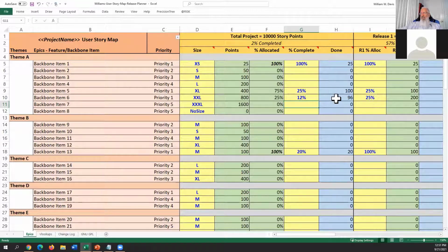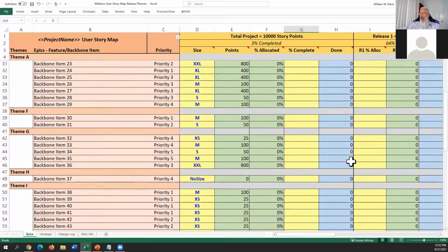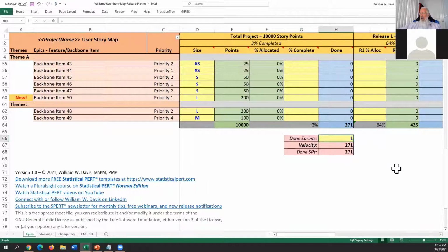We've been working together for 2 sprints. So you got 6% of the overall feature delivered in the first sprint and another 6% in the second sprint. How far did you get with backbone item 13? Oh, we're like halfway there. Okay, so it was at 20% the first sprint, we got 50%. All right, and now that's the end of the sprint report.